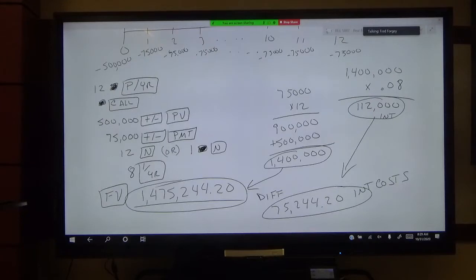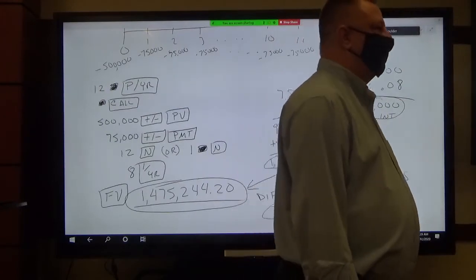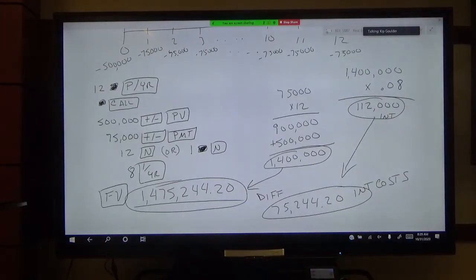Kip, I see you smiling or smirking as I was saying this. What thoughts are going through your mind? You're muted. Yeah, it's just what he said about all the delays in payment, especially all the way down to the subcontractors. They need to wait for the general contractor to be paid. There's a lot of bickering over the pay apps every month. We have to walk through the job and check, is there actually 40% of the electrical work in, things like that. Yeah, but that's why they're getting a down payment at the beginning of the job always. In some cases, but not always.